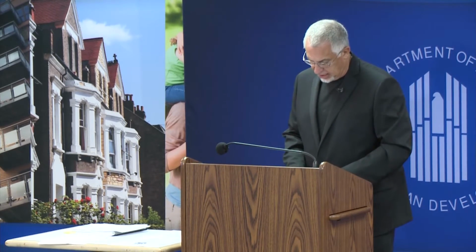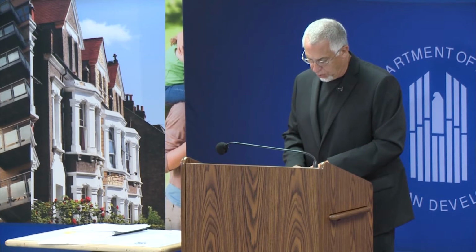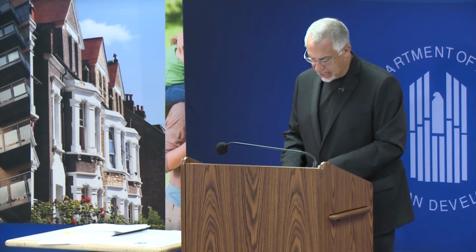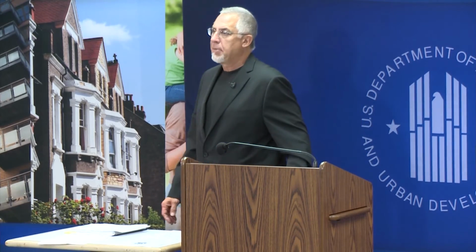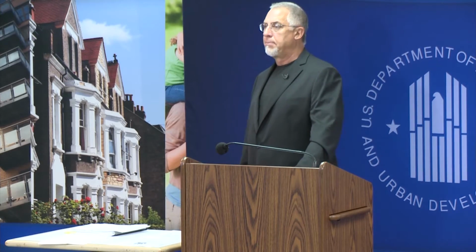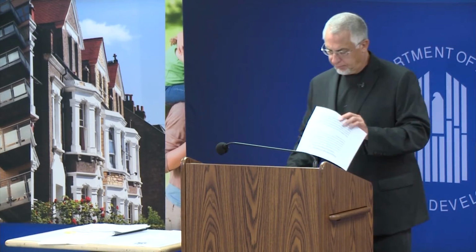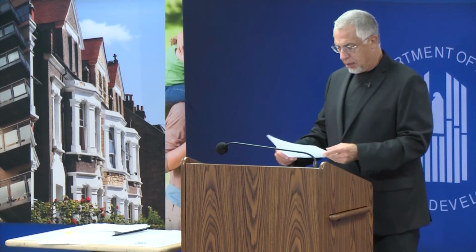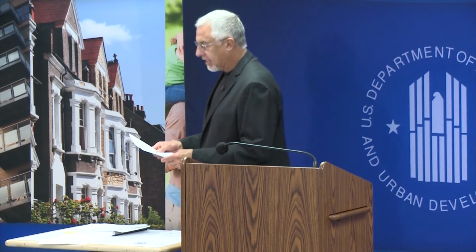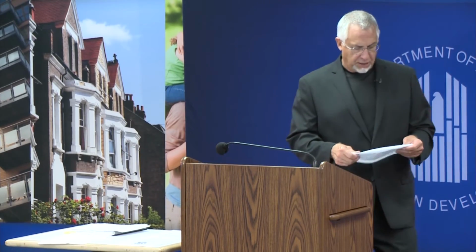And that is identified in 200.323A. That estimates must be made before the bid. Before the bid. All right. That's a trick question there. Okay, let's go on and look at the second question.